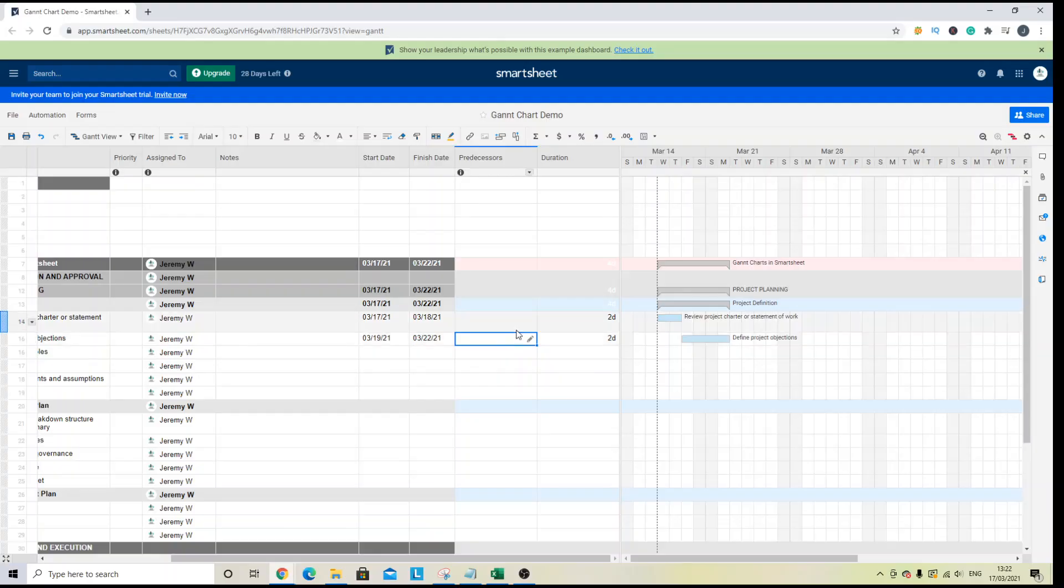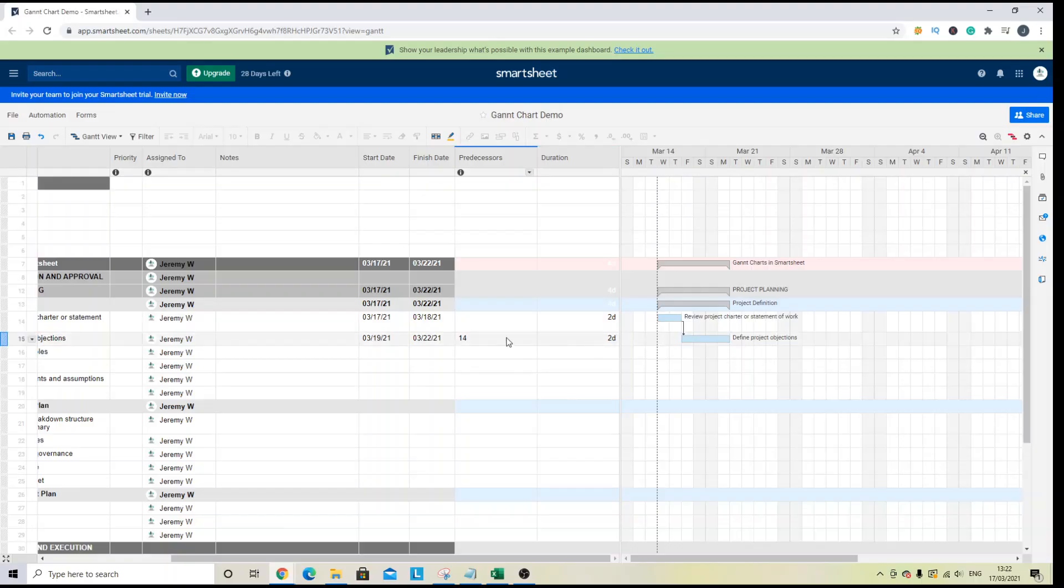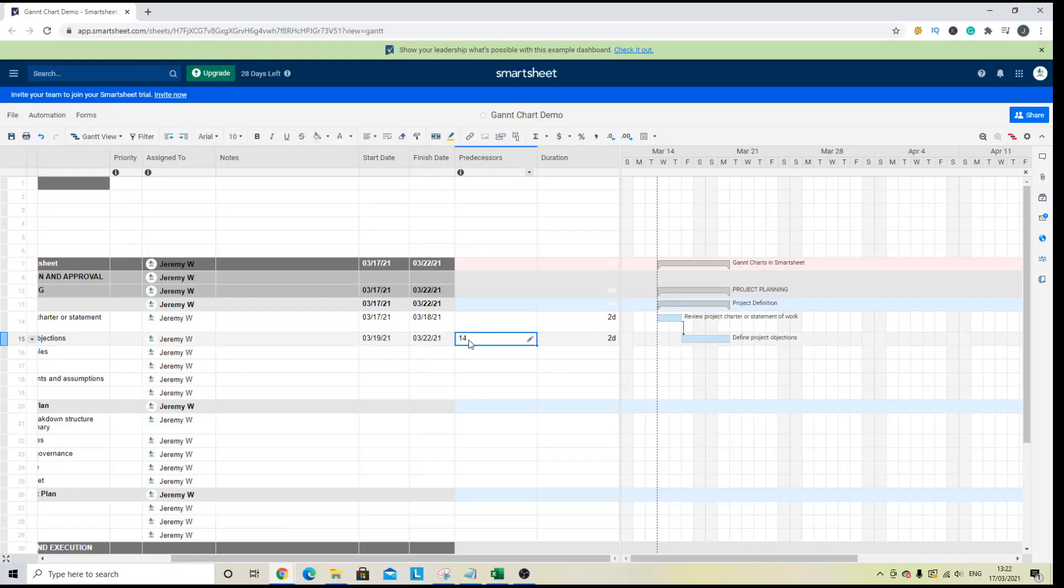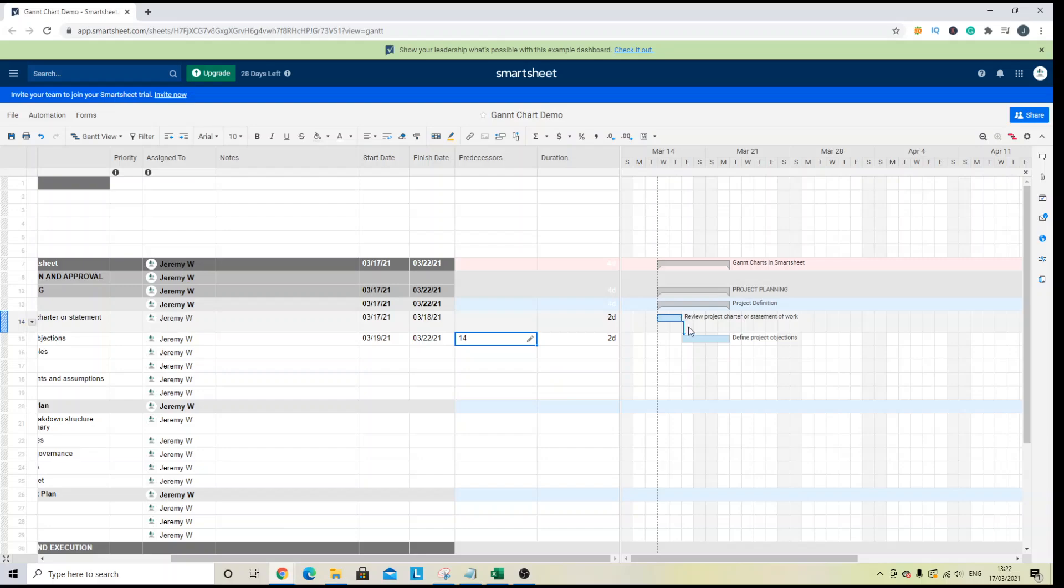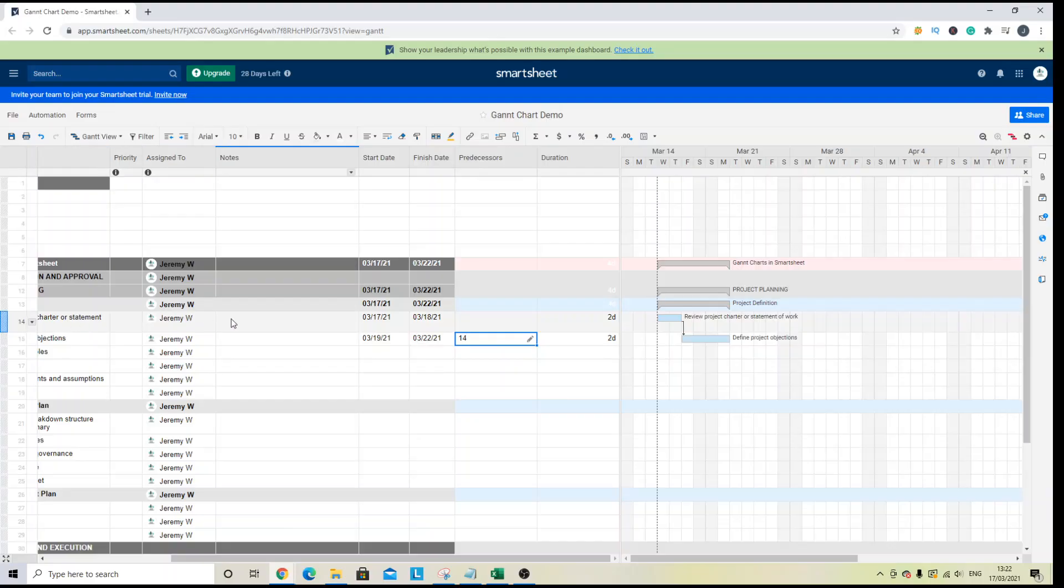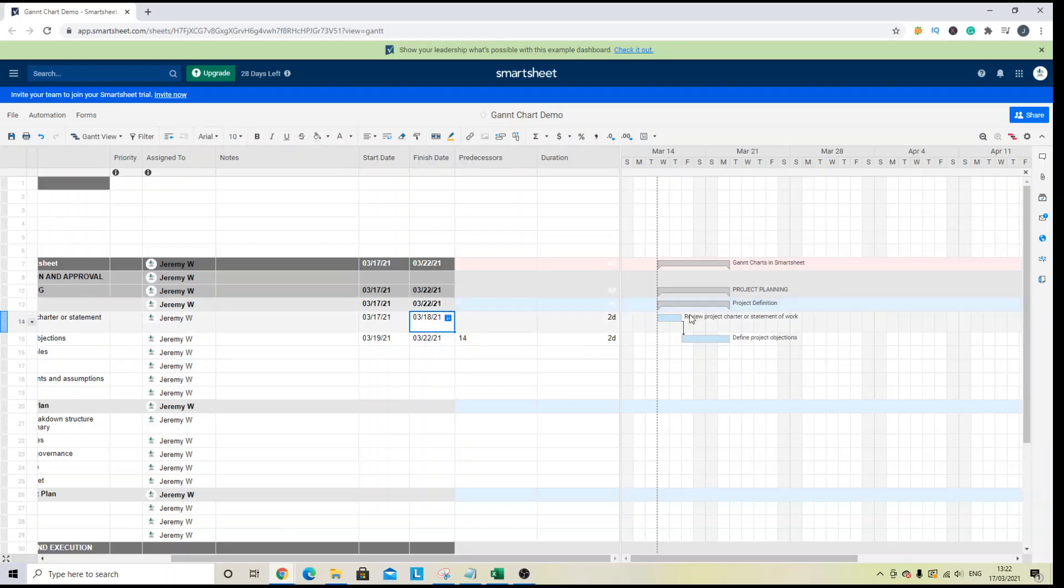So what the predecessor does. So when I set this up again, you will notice the predecessor column populate. Now, what the predecessor column does is it's essentially showing the link between the other rows. So where it says 14 here, I'm in row 15 and 14 is where the predecessor lies. So what this is saying is that the task in row 15 can only start when row 14 has completed. There is a dependency on that task.